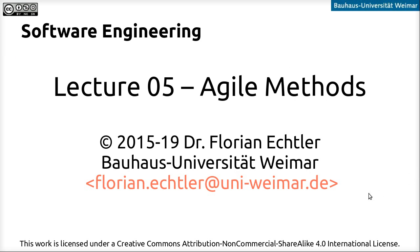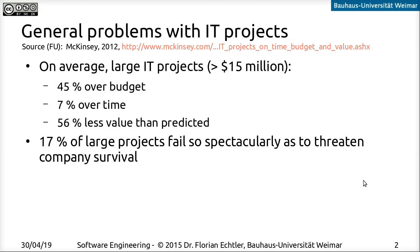Let's continue with our software engineering lecture, specifically with a closer look at agile methods. We already briefly mentioned them in the last lecture. One of the main reasons why agile methodology was started at all was a significant problem with IT projects, especially larger ones. According to a 2012 survey, large IT projects with a budget of over 15 million dollars had 45% over budget, 7% over time, and 56% provided less value than predicted.